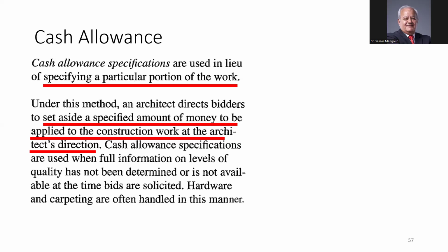And then it can be discussed later. So they will add it to the contract, but not according to any specification. Yes, we will discuss later the materials, the colors, everything, but keep this amount of money aside. So I will not specify anything, but I will ask them to keep this amount for the future.